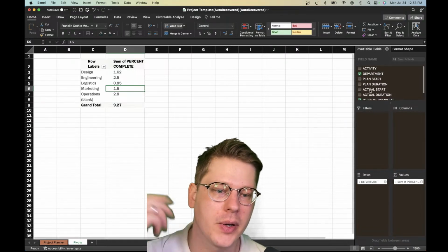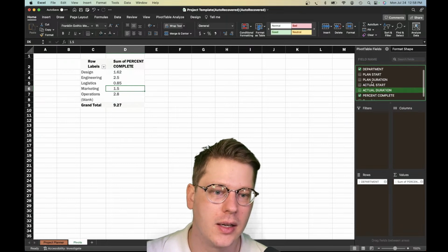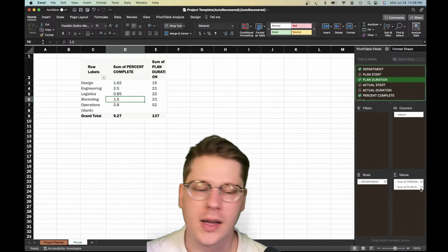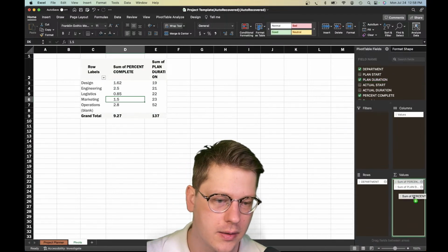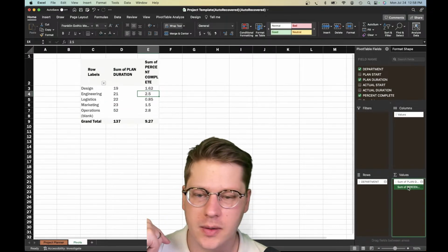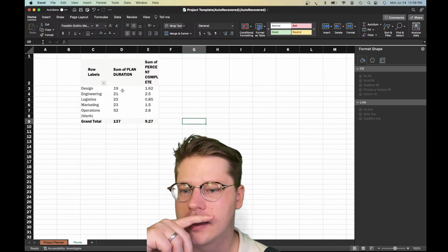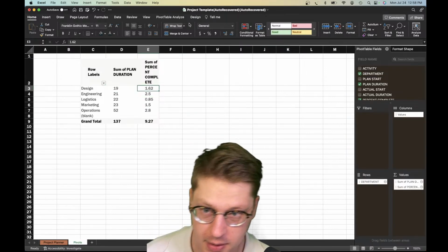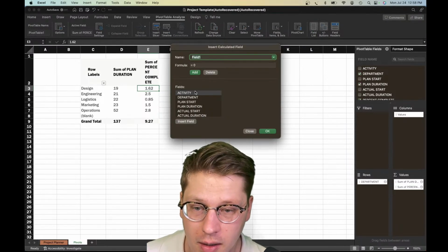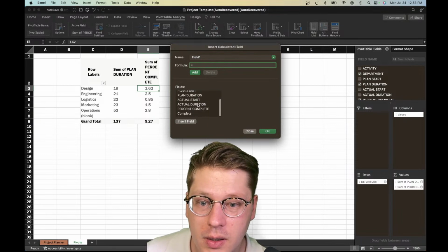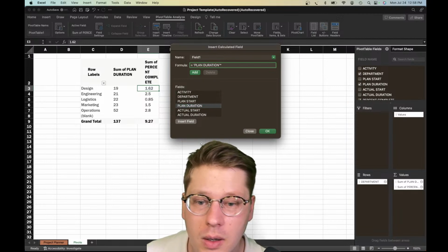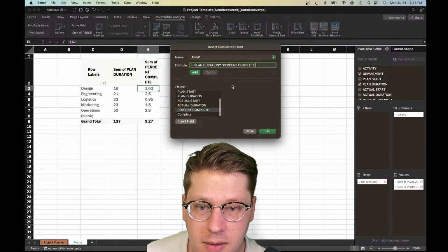Okay, so we were going to talk about doing plan duration, and we are going to have to do a calculated field where we multiply duration by percent complete. So we're going to add in another calculated field here. We want to do plan duration times percent complete.